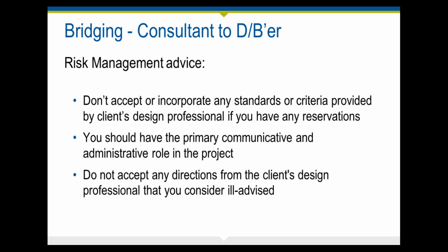Because the involvement of two separate design professionals during construction could significantly increase the likelihood of confusion, ambiguity, and conflict in the construction process, and that leads to problems. So to that end, you, being the design builder's design professional, should not accept any direction from the client's independent design professional that you consider ill-advised.